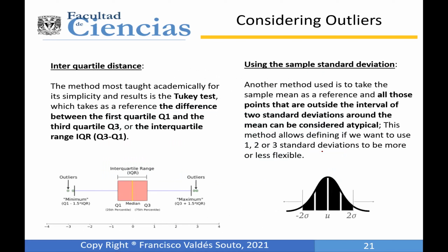After we integrate only these databases, we consider the outliers. The outliers can be identified maybe using the interquartile range or using the standard deviation. For the interquartile range, it could be 1.5 times to the right and to the left; beyond that they are considered outliers.